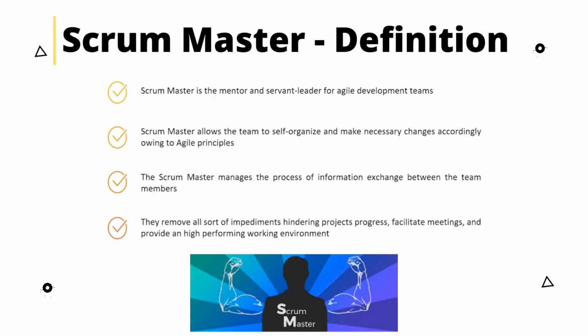The project is broken into smaller pieces called sprints. Sprints assist to come up with an efficient product life cycle within the given deadline. The Scrum Master is held responsible for coordinating all the project activities aligned with business objectives. A Scrum Master facilitates meetings by questioning the team members on the following aspects. What was done yesterday? What will be done today? Are there any obstacles in your way?